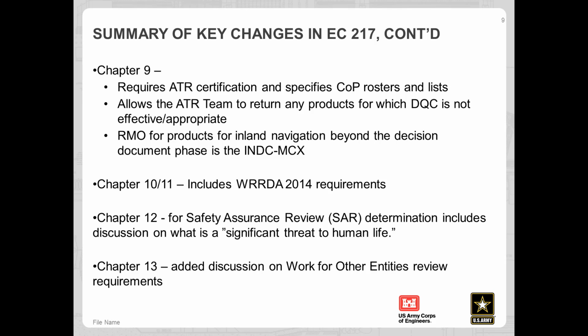Another key change is that the ATR team, if they do receive a product for review and it does not appear any DQC taking place, or it's just not adequate and it's not appropriate, then the products could be returned without review.